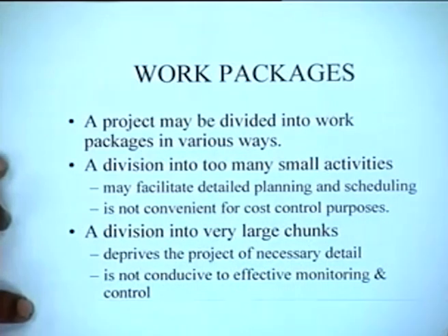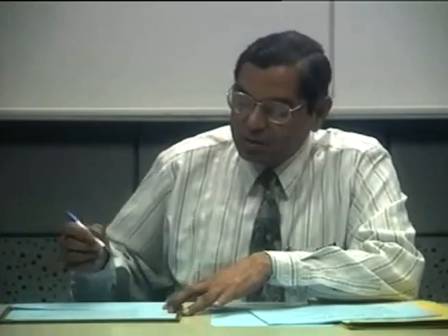So the conclusion really is that if you have to do effective monitoring of a project, you should be able to divide the project into manageable work packages which are neither too big nor too small. And in fact, that is the key notion in PERT cost, the recommended work package.